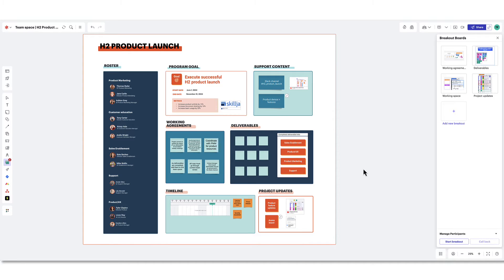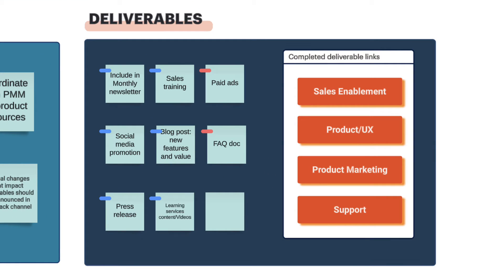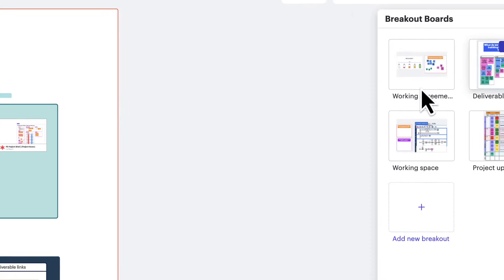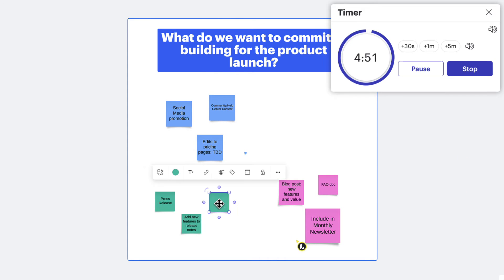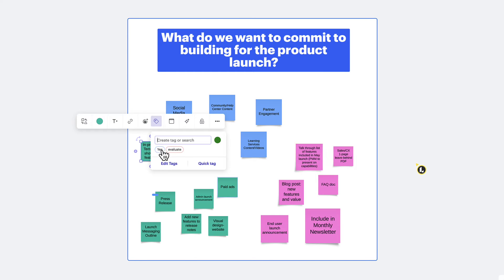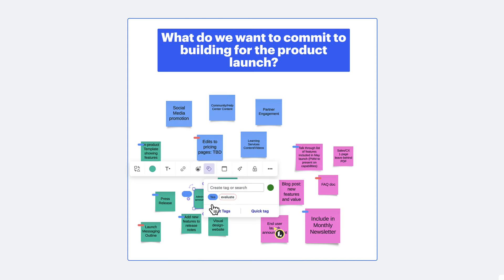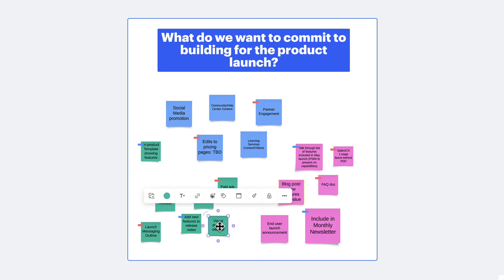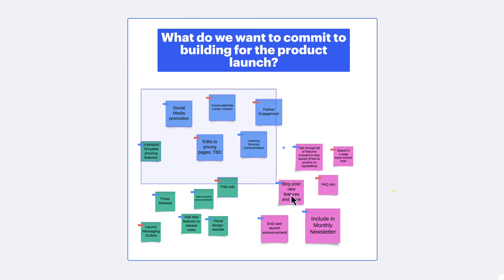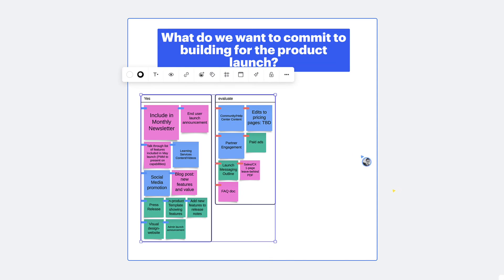Have the team vote for their top 5 and then copy and paste those to the main board for easy reference. Revisit these working agreements with the team during your meetings to ensure things are working smoothly. The deliverables section gives visibility to what everyone is actually building and committing to. During your first team sync, take 5–10 minutes for the team to ideate on deliverables in another breakout board. Then tag all the ideas that the team knows are impactful and can easily be delivered with a yes.